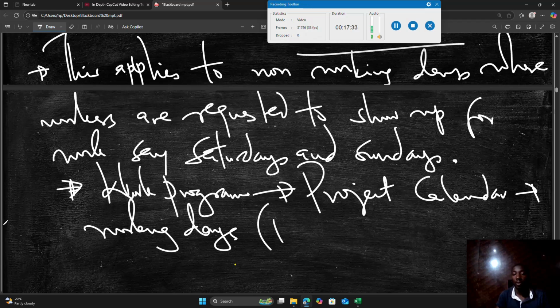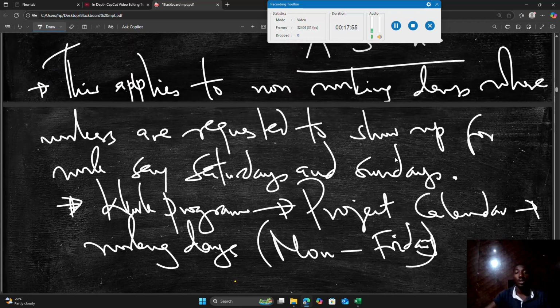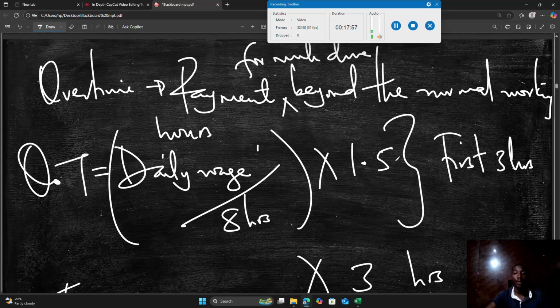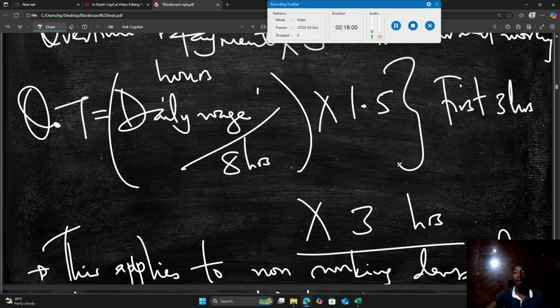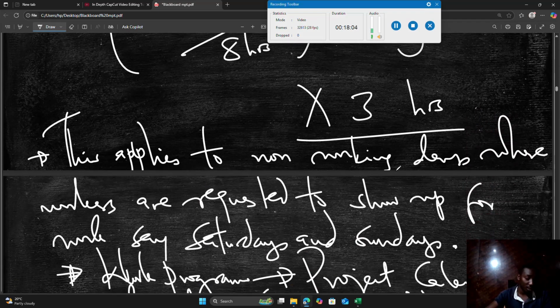If they are working from Monday to Friday, and a very urgent task shows up, say casting of the slab, which started on Friday and must go straight through all the way to Saturday and Sunday, those days will be considered at a rate of overtime, probably at times 1.5 hourly rate, or times 3, depending.